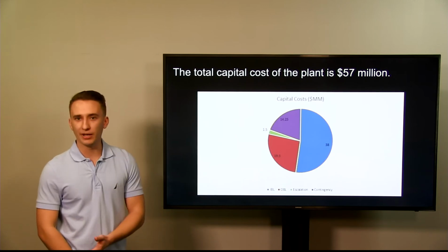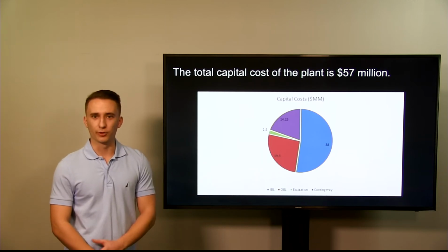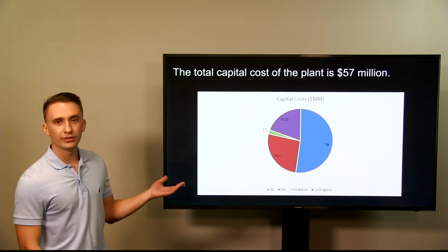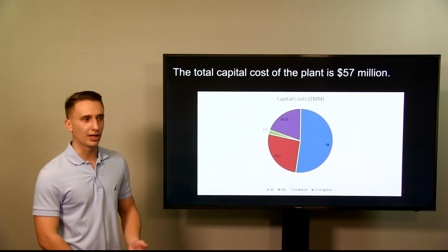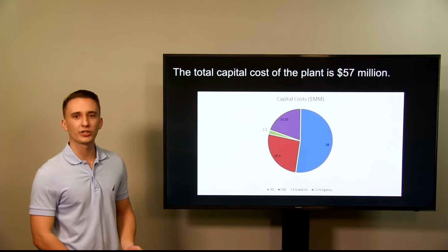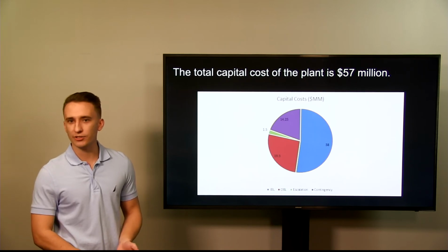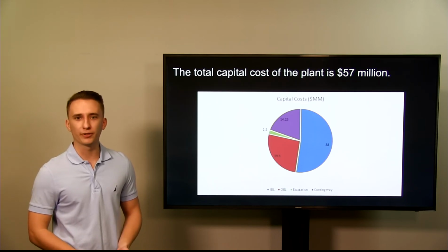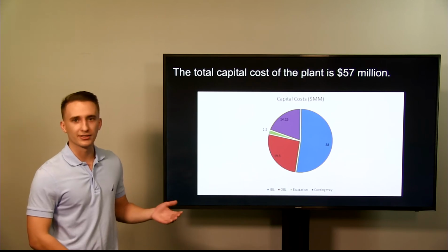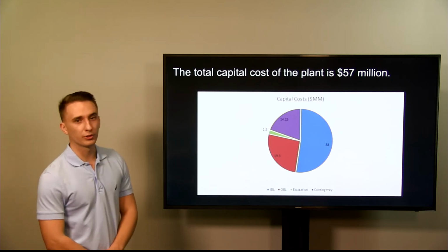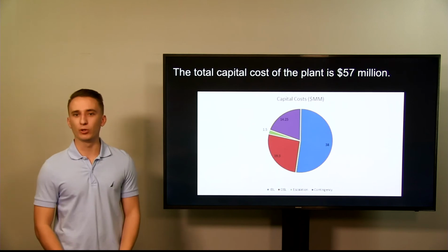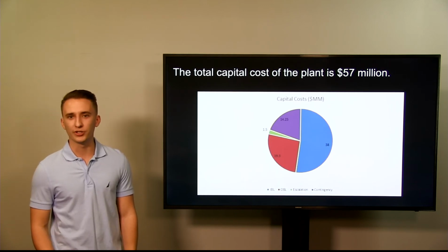The OBL, as Landon mentioned, was calculated with a correction formula. We also had to include contingency in our economic analysis because no project is ever perfect. We expect at least some construction delays or price increases or decreases, so we wanted to have a buffer in order to maintain a consistent budget. Escalation was also included because the plant is being built over 3 years, so we must take a little bit of inflation into account since $1 today is not worth the same as $1 tomorrow.